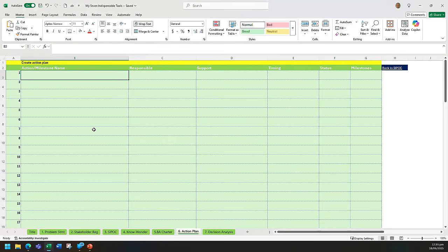So having an action plan like this, and then actually using it, closing the loops and having dates, and then following up with people and saying, have you done this? You said you're going to do this by Friday. Are you on track? All of that sort of stuff. Really powerful. And people will generally, if they've got 50 things to do, do the stuff for the people that follow up, and they'll ignore the stuff for people that don't follow up, or they'll leave it down in their priorities. So I find this works really well.